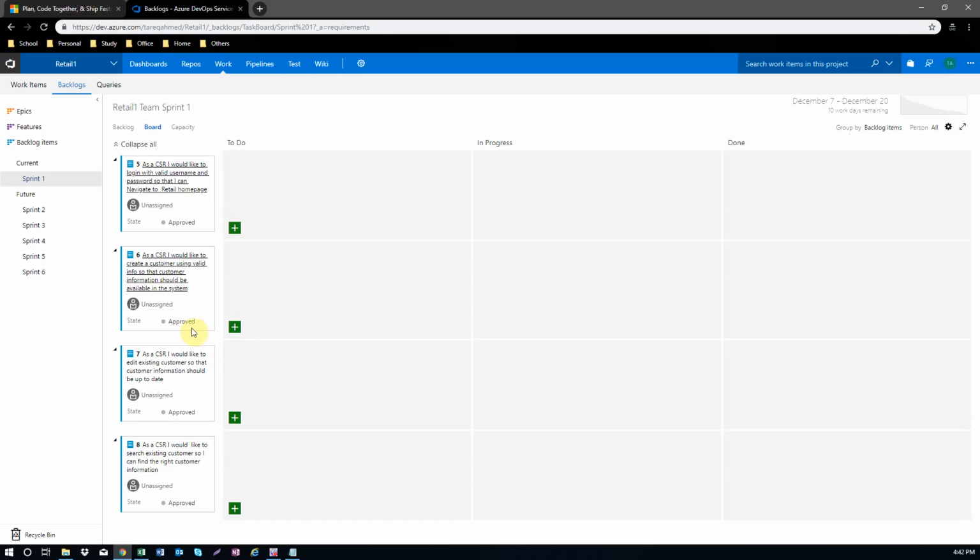So let's go back to the sprint. In the sprint board, the next thing is that a story cannot be assigned to one specific person, because the developer will work on the story, as well as testers, and maybe other DBA people or backend people will work on the story too. So different people will perform different tasks to finish the story. So as a scrum master I have to create different tasks for different people, or different people like developers and testers will create their tasks in the board.